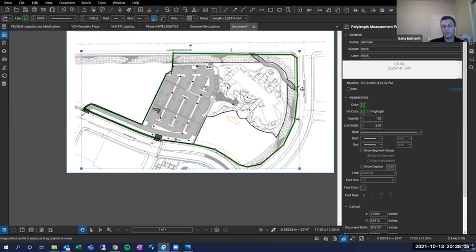And I'll be honest, on fencing, it probably isn't going to get that particular. When I make the phone call to these guys, hey, we've got 2,600 lineal feet of fence, I'm going to say bring 20 extra panels or something like that so that we do have that little bit. And what they'll end up doing on fencing is they'll bring out more and then only charge you for what they actually physically put in place. So I typically try to have them just bring more and then we'll figure out how much we actually got when we get there. But yeah, that's a great point that when you're ordering things like that, you want to make sure that you've got some sort of waste factor in there, some sort of error factor.